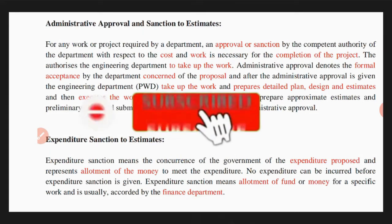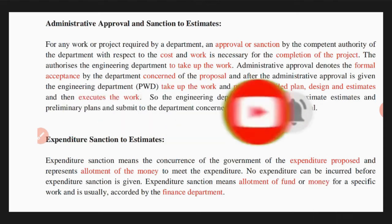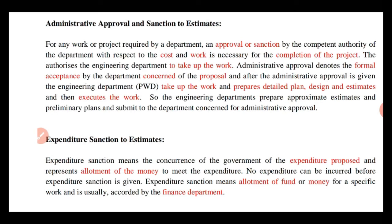Next, expenditure sanction. Expenditure sanction means the concurrence of the government on the expenditure proposed and represents the allotment of money to meet the expenditure. No expenditure can be incurred before expenditure sanction is given. Expenditure sanction means allotment of fund or money for a specific work, and is usually accorded by the finance department.